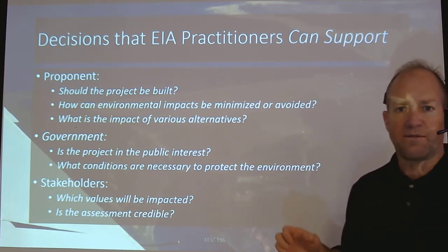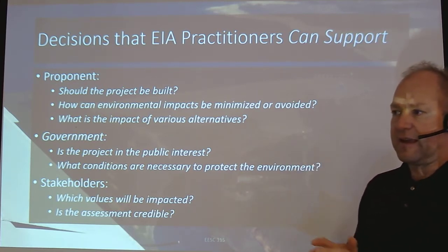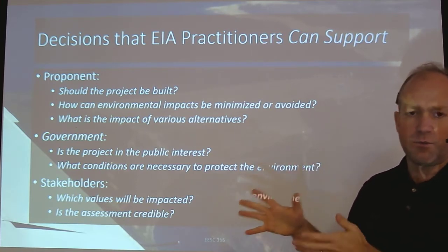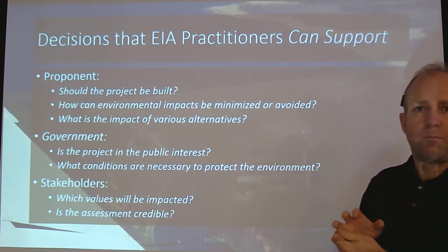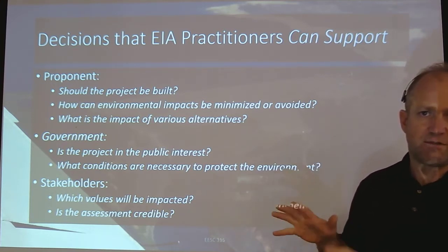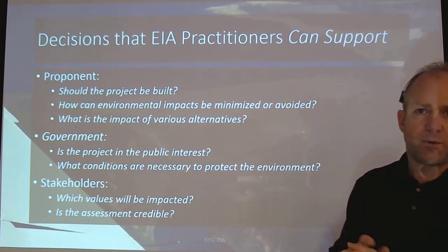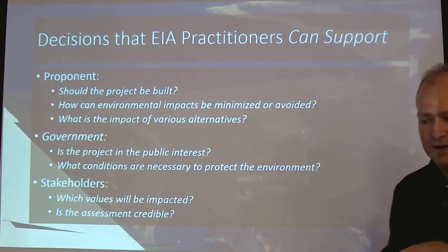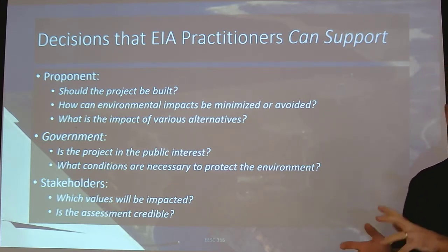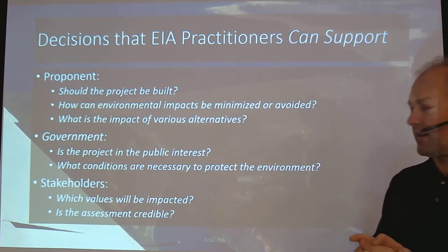So an example of that might be if we do an assessment and at the end of the assessment we have a high level of uncertainty around some specific effect, we would say, there is moderate to high uncertainty, there is high uncertainty, whatever the case may be, which can be reduced over time through monitoring this very specific thing. So we need to be very specific in these recommendations. Otherwise, it's really impossible for some third party to look at this and to understand how can the project be carried out sustainably while reducing that uncertainty over time.